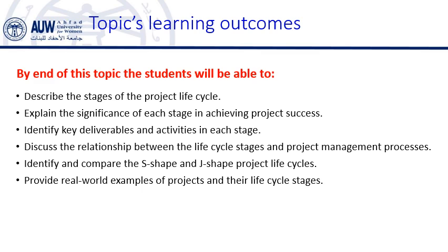So you will learn there are different types of project life cycles that have distinct patterns of effort and cost, J-shaped and S-shaped. The S-shaped life cycle shows a slow initial investment of effort and cost, followed by a steady increase as the project moves into execution, and then a decrease as the project is completed.